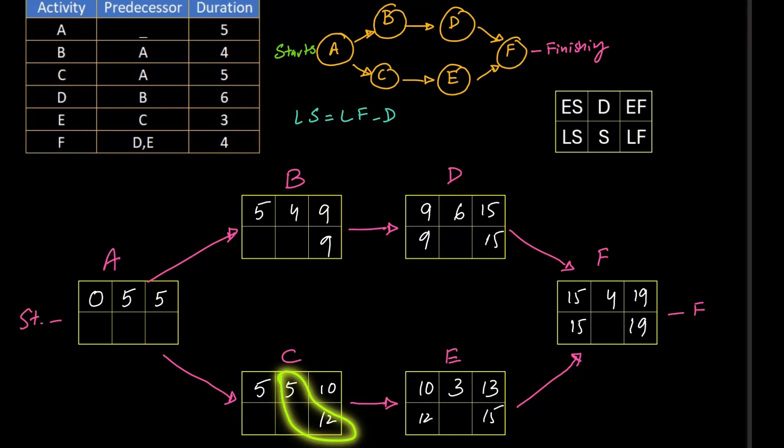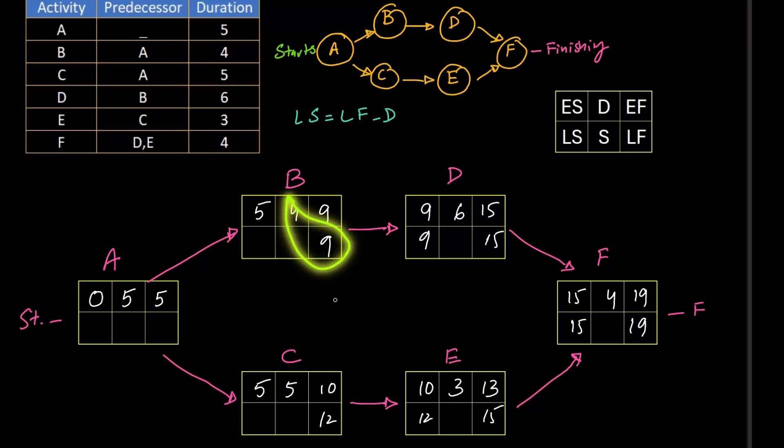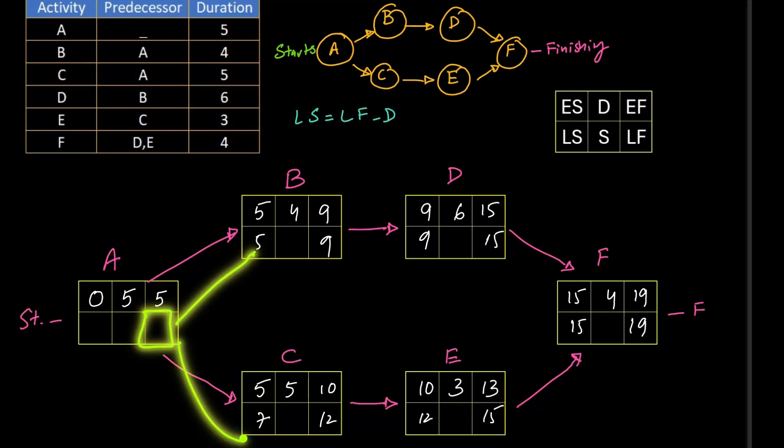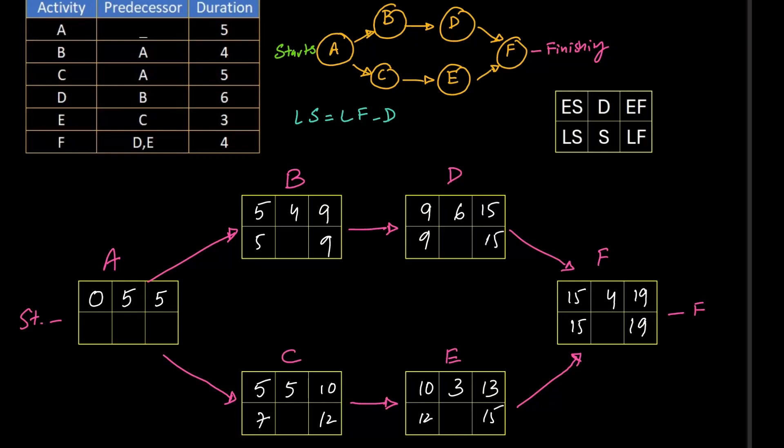12 minus 5 equals 7. 9 minus 4 equals 5. In this box there are two options, 5 and 7. When we are going backward in the activities, we need to write the smaller number. Here 5 is smaller than 7, so we will write 5. And again 5 minus 5 equals 0.